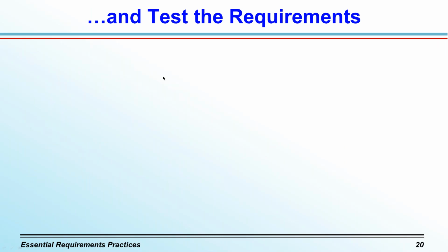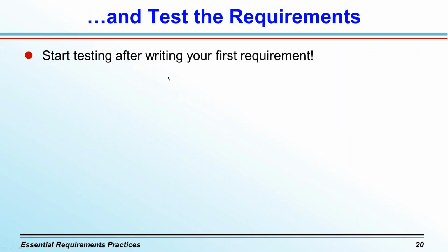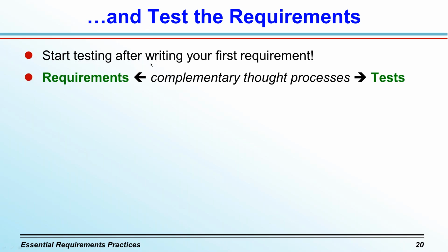Now, I learned a long time ago, you can begin testing your software as soon as you define your first requirement. That was a real eye-opener for me when I first realized it. Requirements describe what to build and how the solution should behave in various conditions. Tests describe how to tell if the solution is exhibiting the correct behavior and define situations where it does not. So long ago, I discovered that writing tests from my mental image of how the system should behave is a different thought process than writing requirements. So I would do both.